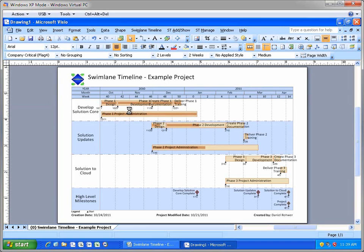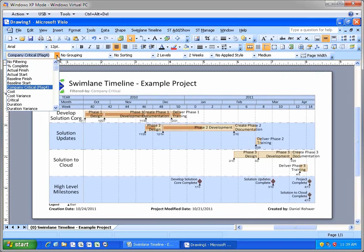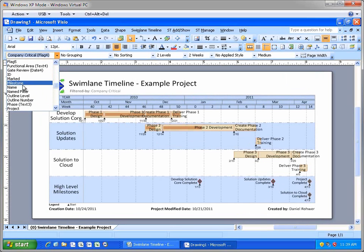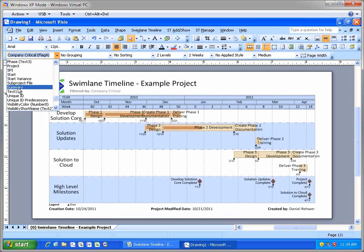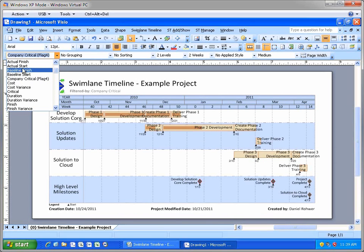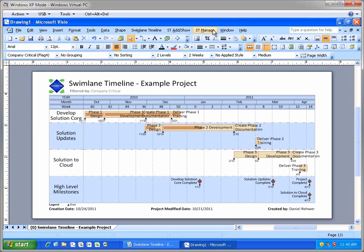The Filter By option can filter on standard project fields like milestone, summary, and critical tasks. And it can also filter by custom flags, text, dates, and numbers. In fact, the Swimlane Timeline actually has two types of filtering. The Filter By option that I just showed you is based on yes, no, true, false, or simply non-empty fields.